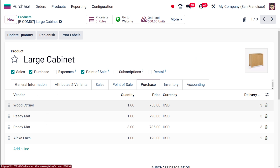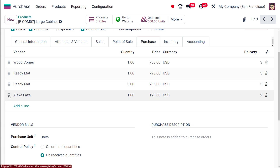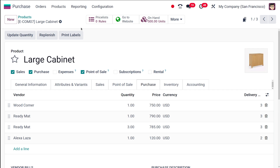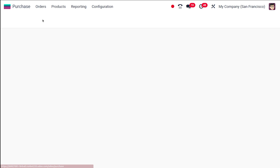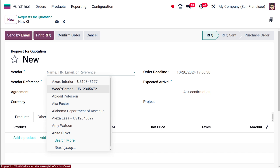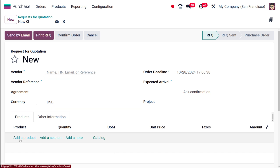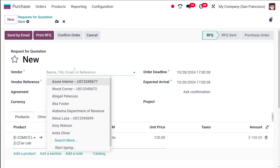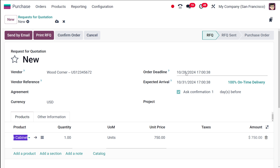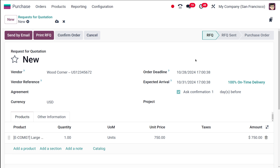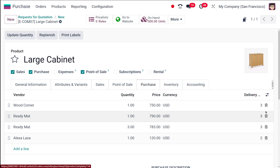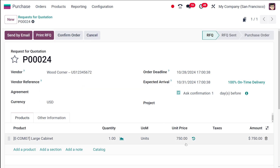If you want to change the vendor priority you can drag and drop them. Wood Corner has a lead time of three days, quantity of one, and price of 750. Let's go to Orders and create a new RFQ for the product Large Cabinet. Wood Corner is automatically populated, and the expected arrival is calculated as three days out, which matches the delivery lead time of three days with a quantity of one and a price of 750.